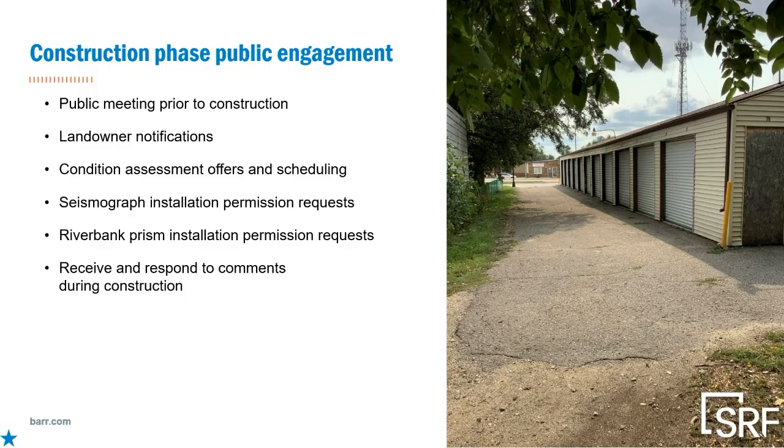One thing that the public had concerns with is the existing instability on their riverbanks. There are some issues with reduced stability during seismic loadings or earthquakes, which is a kind of vibration-induced loading. We're orders of magnitude less on that front from a pile driving standpoint, so we're not concerned about vibration-induced lack of stability for the landslide on the north side of the river. But we are gonna monitor that and show that our construction activities don't line up with any additional movement there. And then we have our communication specialist that is gonna receive and respond to comments during construction.